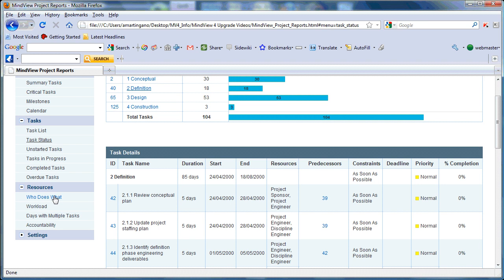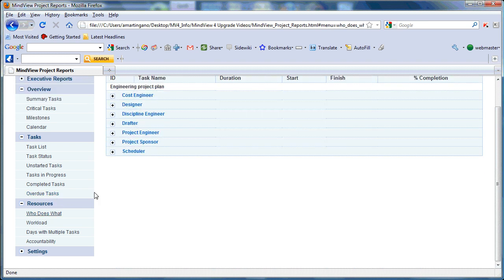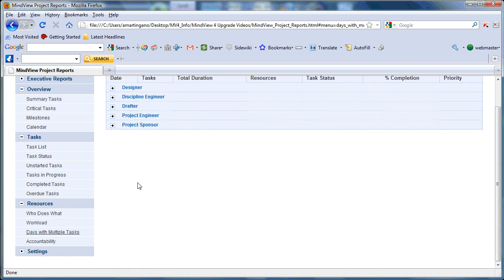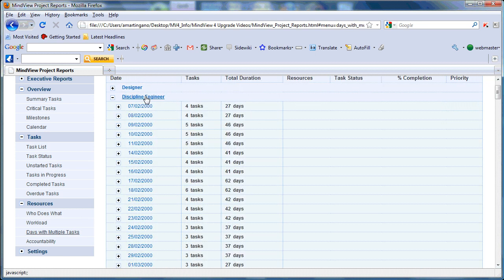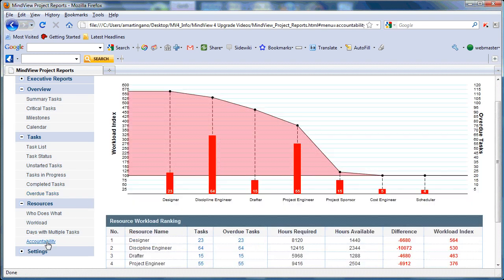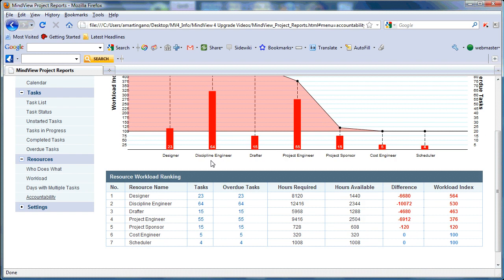Our resource information reports allow you to break your team apart by each individual resource and show each task that's been assigned to them. Our days with multiple tasks allow you to dictate each individual resource and days that they have more than one task assigned to them for correct scheduling procedures. Our accountability report combines the benefit of a workload index with overdue tasks to show each individual team member based on their workload index.